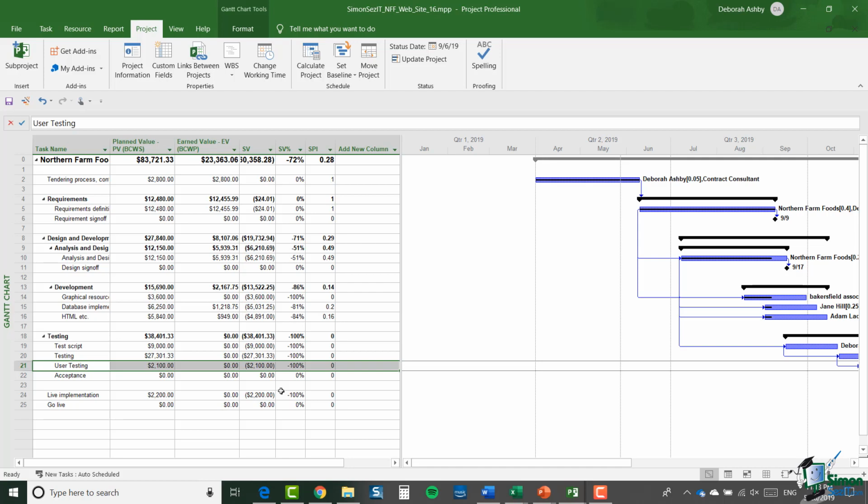but if you did discover that you'd missed a whole chunk of a project, or perhaps part of a project is de-scoped and a whole set of tasks are to be taken out, it would be much more useful to save a new baseline or at least adapt the original baseline to take those tasks out of the original baseline. Now as I'll show you in a little while, by default earned value analysis uses the status against baseline, so that is the default saved baseline. If you do need to save a different newer baseline because of major changes to the project, such as realizing you missed something, then it's a straightforward job to tell Project to do earned value analysis against an alternative baseline.